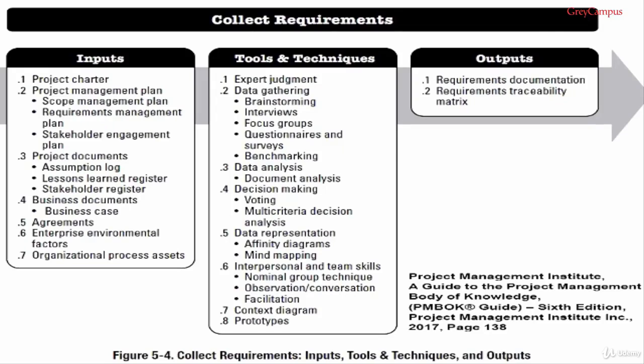The final data gathering tool is benchmarking. Whenever you see the word benchmarking, always think of comparing with something similar. In this case, you can compare the required products, service or results with other similar offerings in the marketplace, or even within the same organisation, to see if the requirements could be improved.